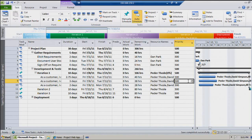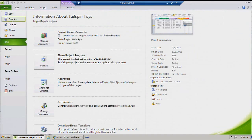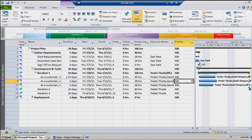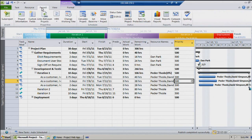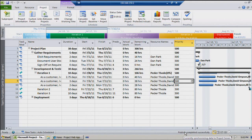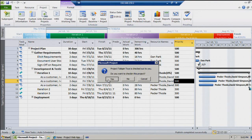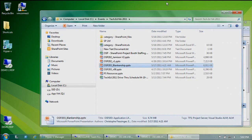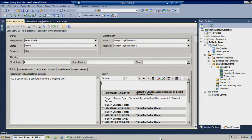In this first scenario, the Agile team is giving me the information and I don't need to take action or reschedule. I've got the information in my plan, so I'll save and publish it. As a project manager, I got this initial estimate from my team of developers, so I'm just going to set a baseline so I can track how the dev team does over time. I set the baseline, republish one more time, then hand over back to the dev team.